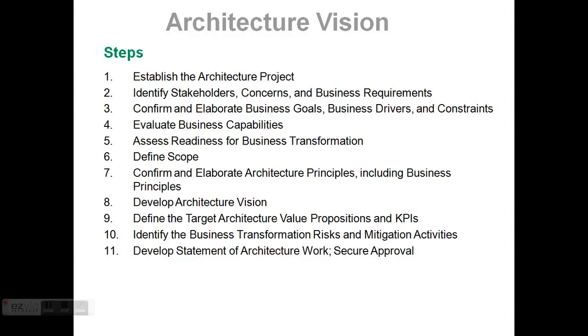Develop the specific enterprise architecture communication plans and show where, how, and when the enterprise architect will communicate with the stakeholders, including affinity groupings and communities, about the progress of the enterprise architecture development.